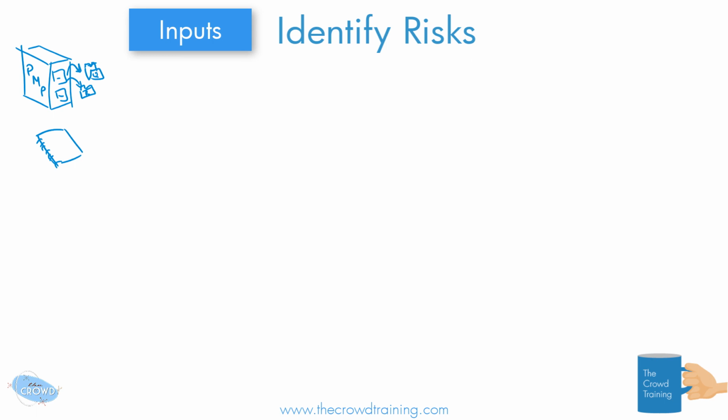There are lots of different project documents that we have throughout. The schedule, right? When we're looking at constraints and maybe even our assumptions log, right? We assumed that certain things would happen or not happen, and an assumption is just something we as a team, or maybe even our experts on the team, subject matter experts, have said, yeah, we assume this, but there's a level of confidence, but there is no assurance for certain that something will or will not happen. So those are all good locations to bring out some risks.